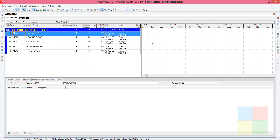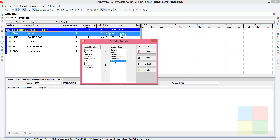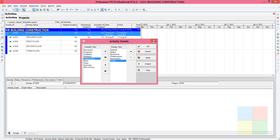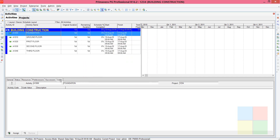We are on the activity window with five activities. Click on the first activity, then go to the Codes tab in the Activity Details panel. If you don't see the Codes tab, right-click and go to Customize Activity Details — Codes will be listed there. Select it and pull it to this side using the arrow key, then Apply and OK.